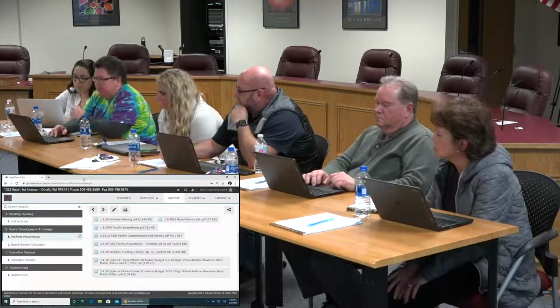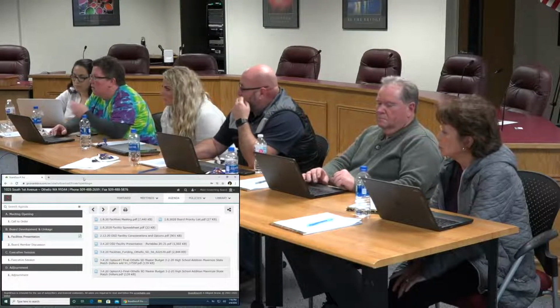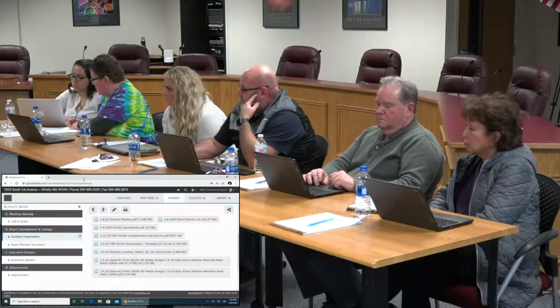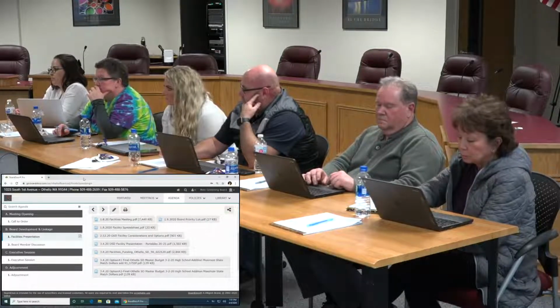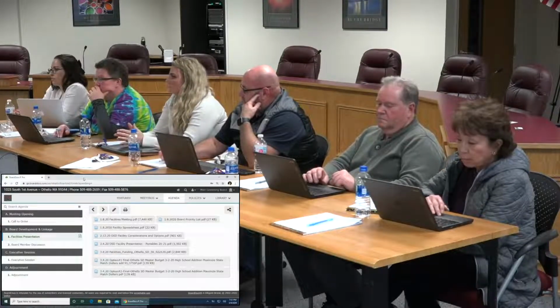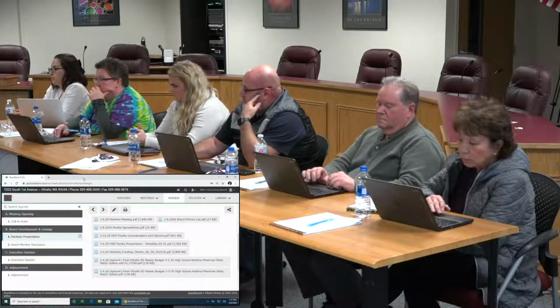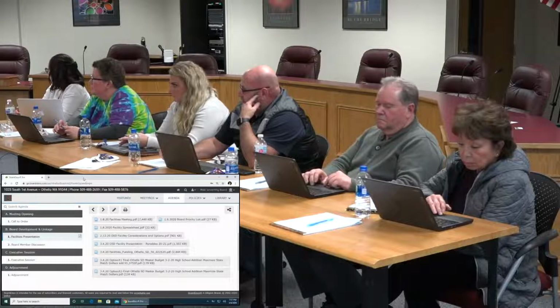You are looking at probably a 2024 completion. If you passed a bond for the high school in November or a late date like February 2021, you're still conservatively looking at a 2024 fall occupancy for the high school. And if you added a K-6 into that, just quickly looking at it, you would run a chase. When you're done with the design of the high school and bid it, you'd launch into the K-6 design and try to bid it about a year later, as soon as you get a funding release letter in the July of the year of your high school bid. That's a pretty accelerated pace, but it could be done. So probably 2024 for the high school, 2025 for the K-6.